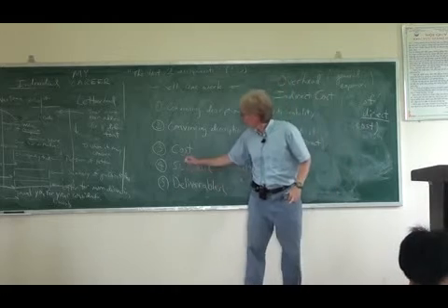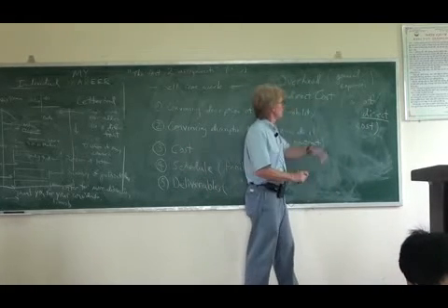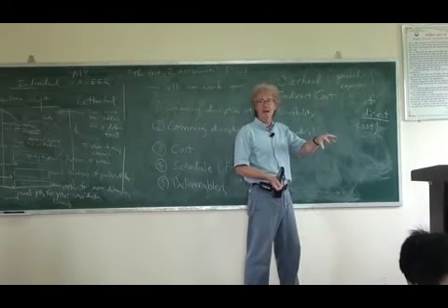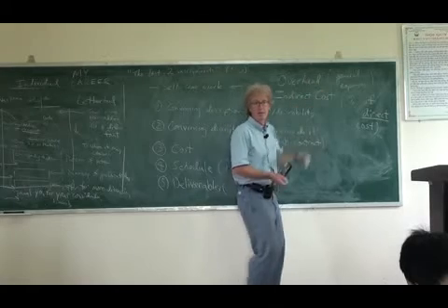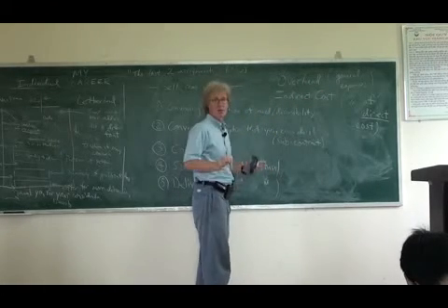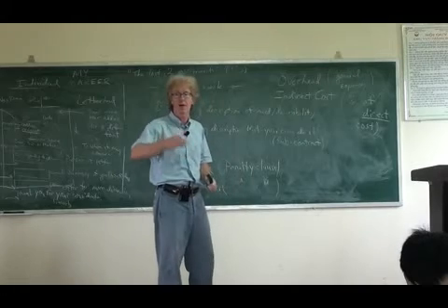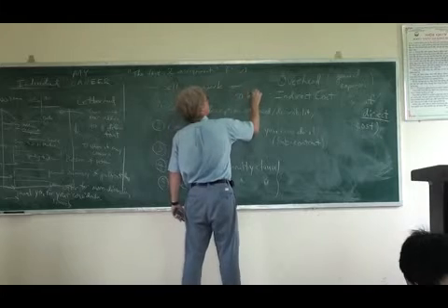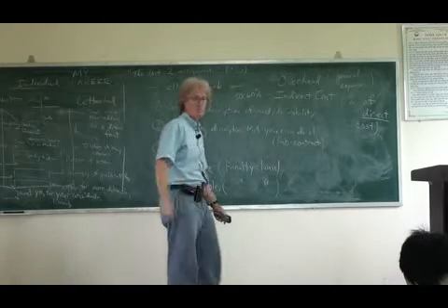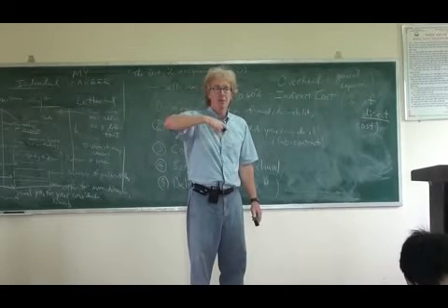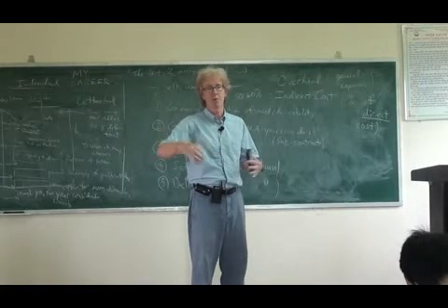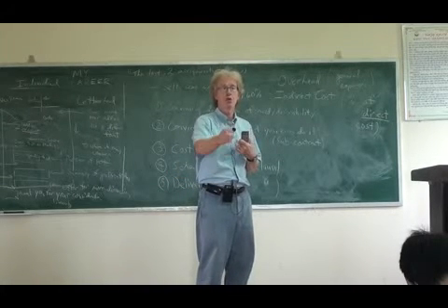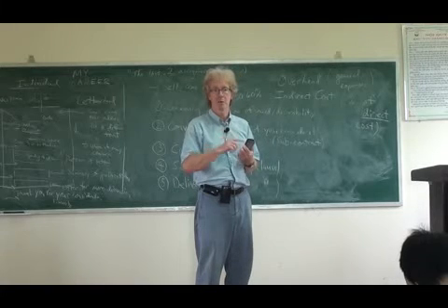So when you make up the cost for your project, in the budget, you have a lot of direct costs, and at the end of all the direct costs, you take some percentage of that, and you add it as an indirect cost. And most American universities, just to give you an idea, do lots of contract work all the time. A typical indirect cost is between 50 to 60%. So if all of the direct costs of doing the project add up, say, to $1 million, then when you submit the contract proposal to me, your contract proposal to me would be $1.5 million, not $1 million.